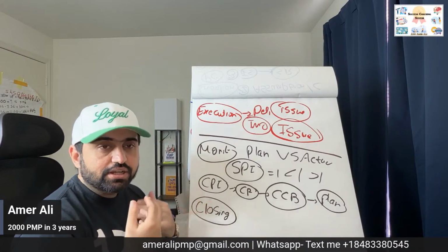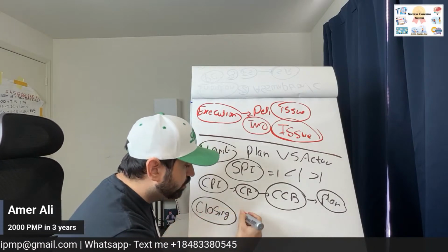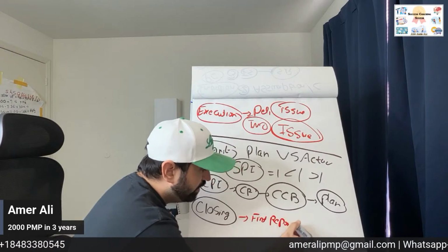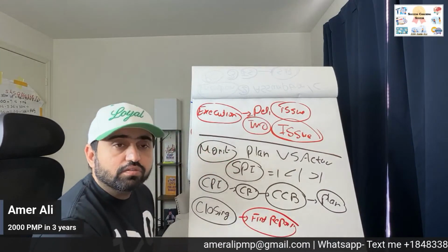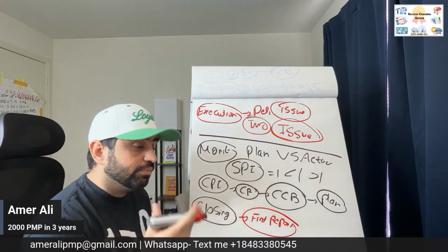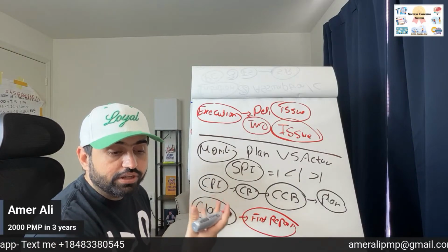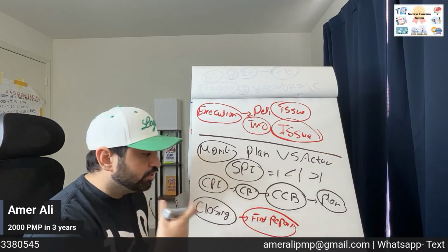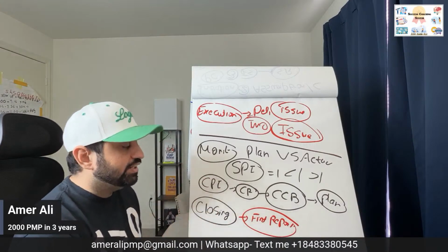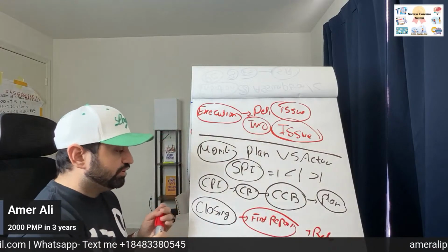In both cases, we start writing the final report that will have the summary of what good, bad has happened in the project. We start writing down the lessons learned register, we update the lessons learned register, and we update the project documents. Then we archive those documents and then we finally release that. That is basically what happens in your 5 process groups.